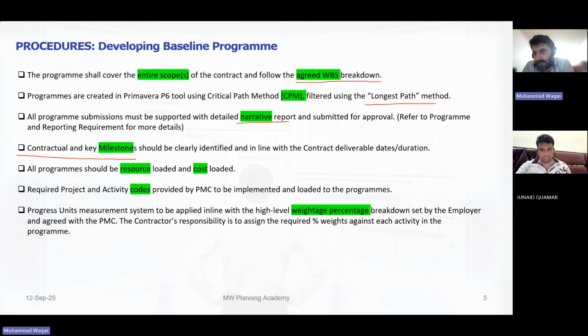Just giving an example, there are 3 levels, and in each level there are 6 zones. Now easily you can see from coding when level 1 zones will finish, or when zone 1 in each level will finish. So by coding, you can see both ways. Okay. Once we go into detail, we will spend a good time on this.